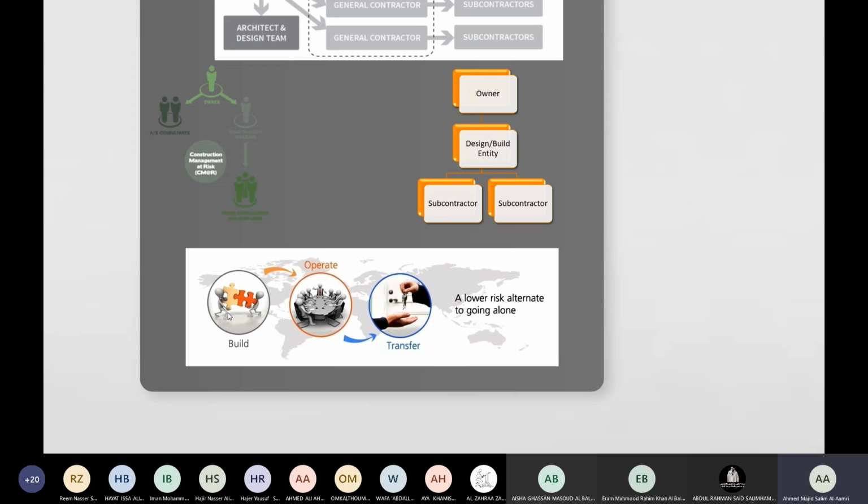After that, there will be an agreement between the government of Oman and the investor, that the investor is going to operate, to run this particular power plant for a certain period, in which he is going to make sure that he is returning back the cost, plus he is getting a certain amount as a profit for him. After that particular period, the ownership of the facility will go to the government of Oman.